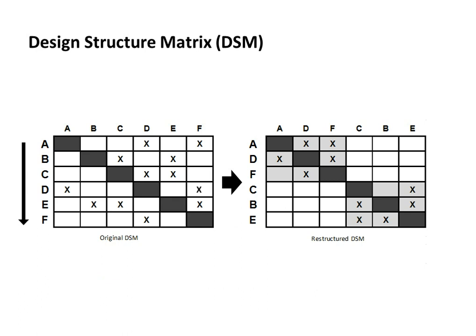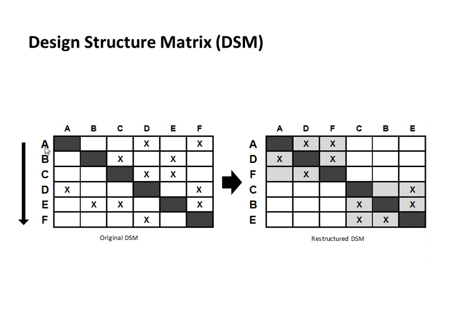There is a tool called the Design Structure Matrix, or DSM, that can be used to do this. The DSM is a square matrix with identical row and column elements, which can either be components in a product, activities in a project plan, or people in a project organization. In a so-called dynamic DSM, like we are assuming here, the assumption is that the elements are sequential, so that A precedes B and B precedes C and so on.